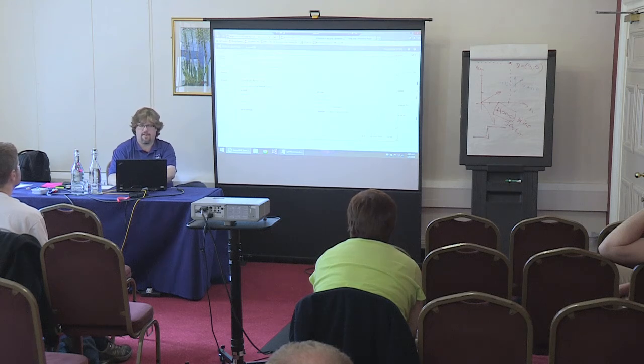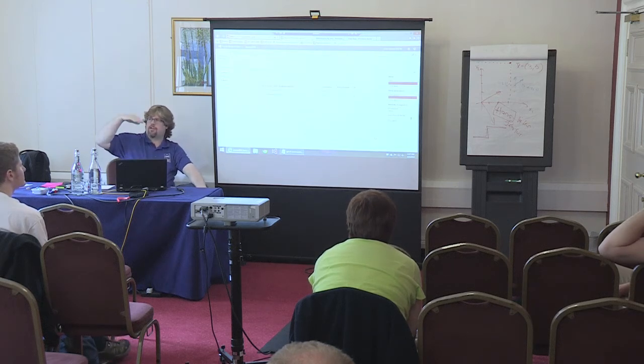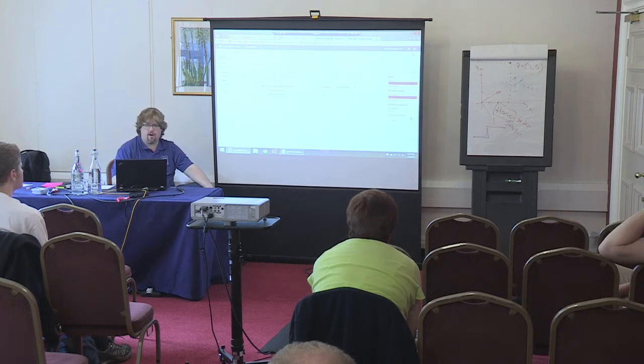And we're going to put this at 50 hours. Now watch what happens. It goes to red, because it's trying to show me that I have more work allocated than I could possibly get done. Now the cool thing about this, if I go to my home page now, I'm going to see the same thing. I'm going to see that data right up in my face automatically.